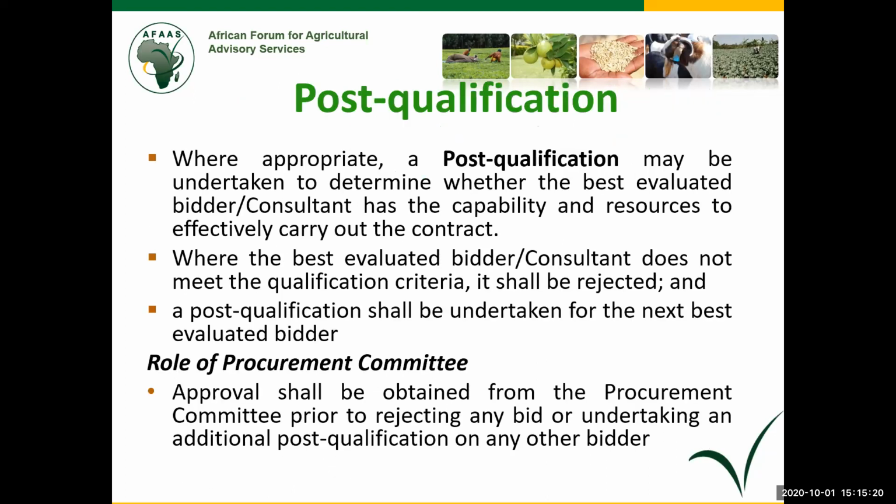Post-qualification can be done to know whether the provider has not lied. There are some circumstances where we have tried one and we discovered that the consultant was lying, that he did a lot of work in particular areas. So when we post-qualified, we discovered that he was actually lying and he was eliminated on that ground.